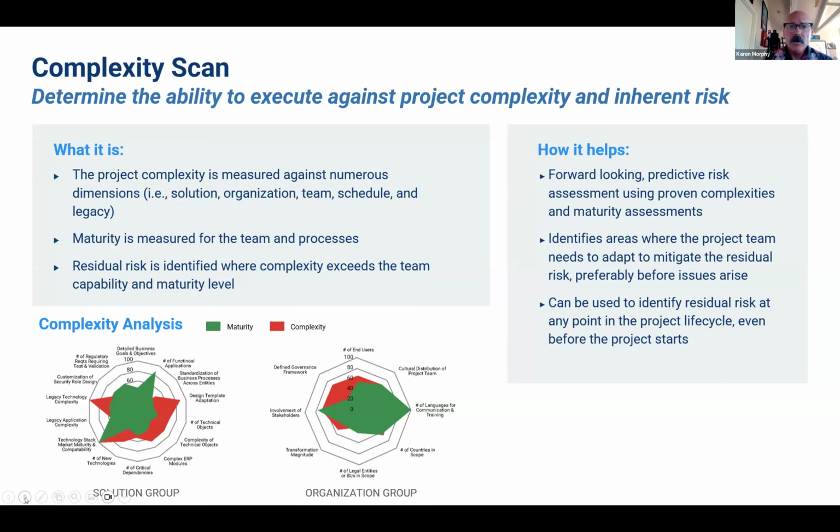So we developed, if you will, a change management process and a relationship with all those application owners so we could develop trust with them, basically through helping them understand our plans, helping them understand when things went south, what we were going to do to fix it quickly, and how we were going to implement the changes in test environments and development environments, and make sure that they were 1,000% comfortable that the changes were not going to affect their production environment, and that we could move forward to go into production.